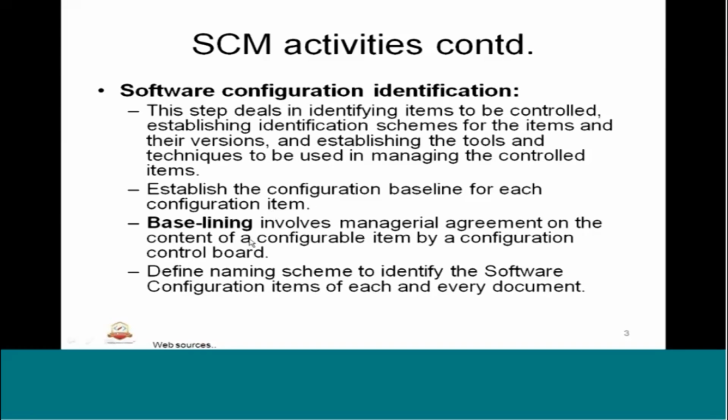Baselining is a very important activity that involves a managerial agreement on the content of a configurable item by a configuration control board. There is a board called CCB which involves subject matter experts in terms of CM, project management, etc. Basically they come to a conclusion that this item can be baselined.